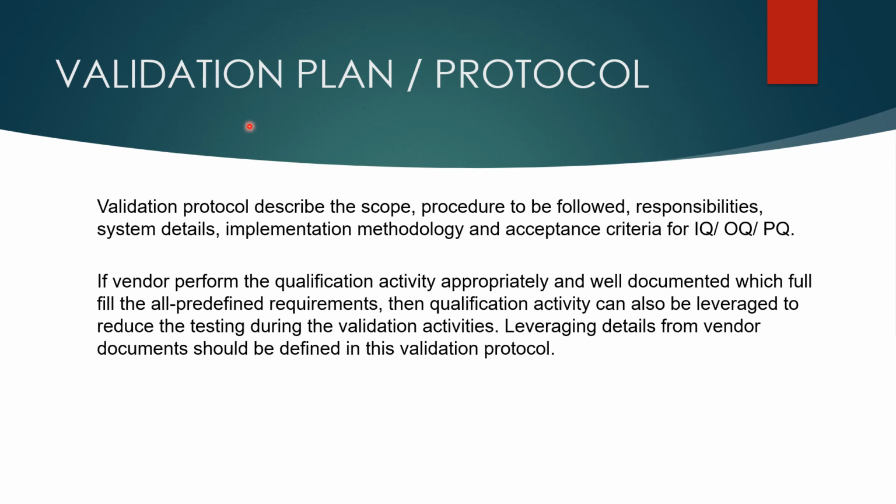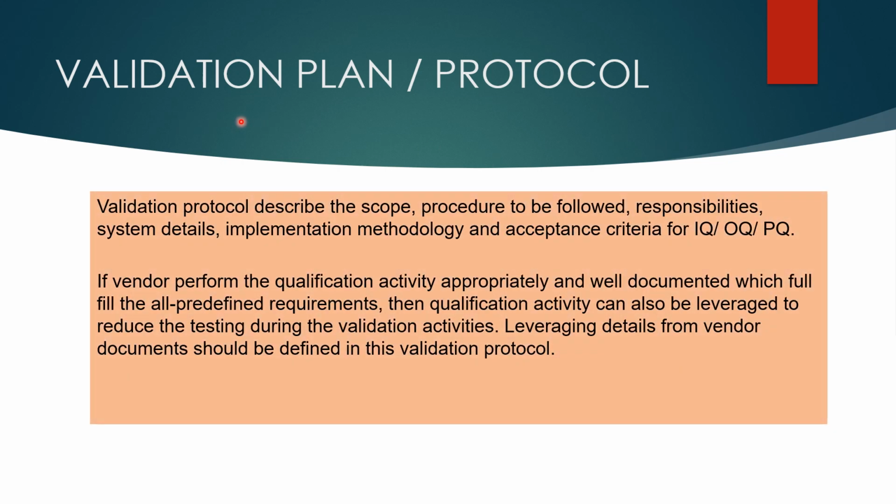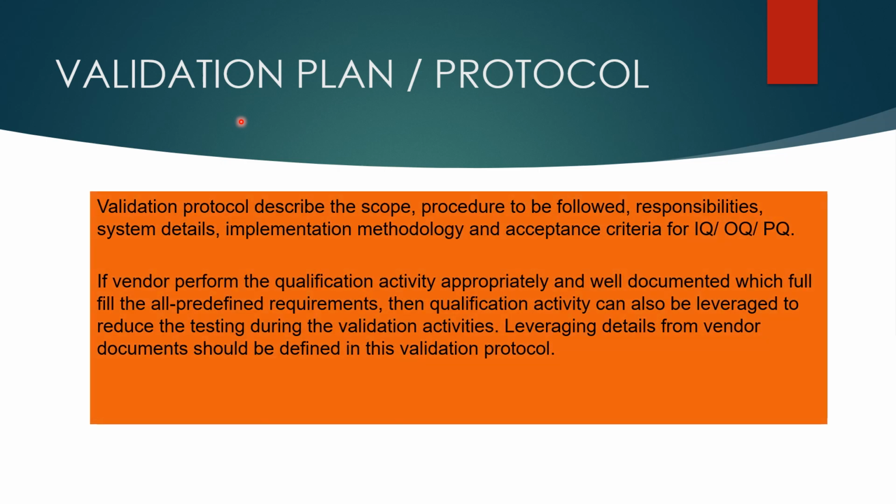So now we will discuss the validation protocol. Actually, the validation protocol is the key document for validating a computerized system, where you need to mention all the approaches to validate a system. In this validation protocol, we need to describe the scope, procedure to be followed, responsibility, system details, implementation methodology, and acceptance criteria for IQOQ test scripts.